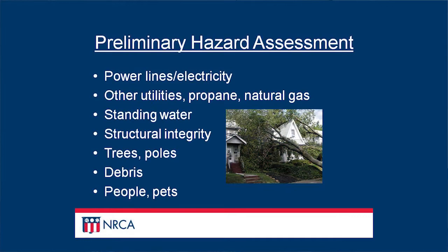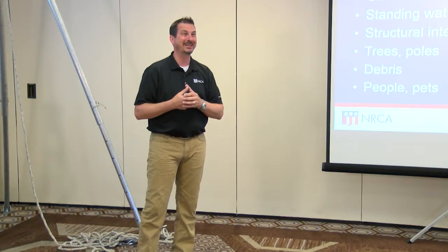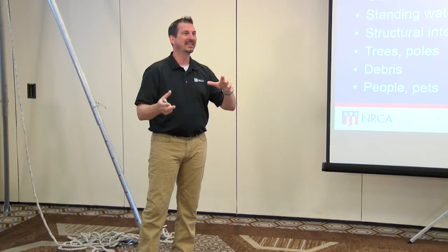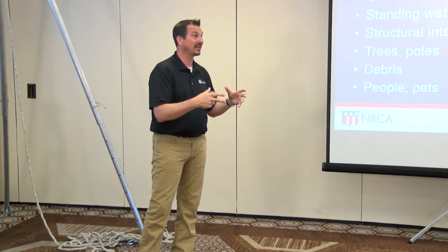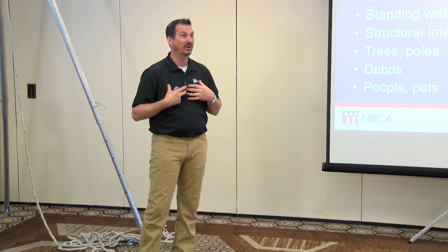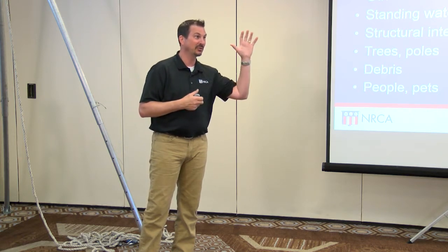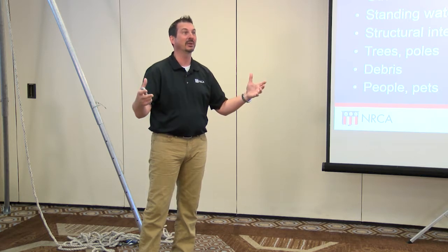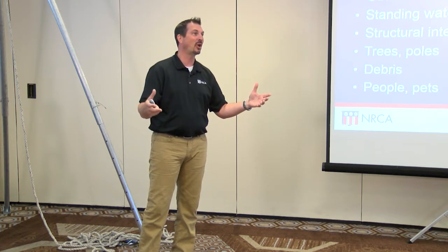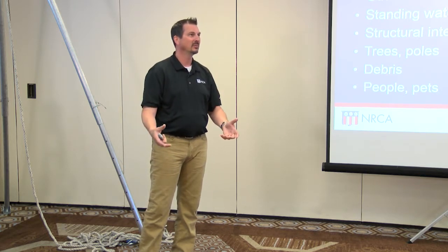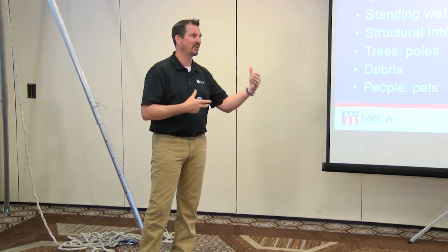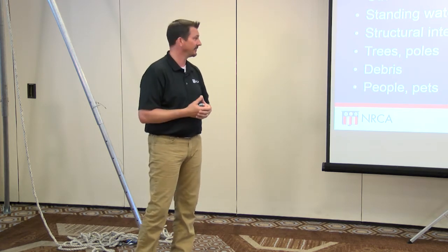Debris, this is another one that we have to look for. What junk is gathered there? And I think yesterday on the webinar I had mentioned that debris is another thing that we're not necessarily responsible for cleaning up on a job site before we get there, but how many of us as roofers have gone out to a job site and had to clean up an area that wasn't our fault, or the debris wasn't our fault, because we forgot to look at the job ahead of time and ask if they could move some of this stuff.